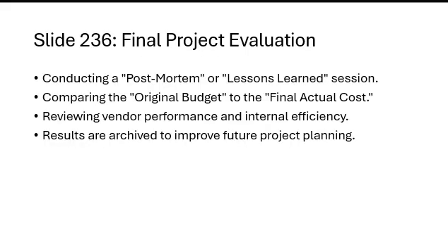Final project evaluation. So a post-mortem session reviews lessons learned from the project. Compare the original budget with the final actual cost. Review vendor performance and internal efficiencies. Archive the results to improve future project planning. Evaluation strengthens organizational learning and improvement.